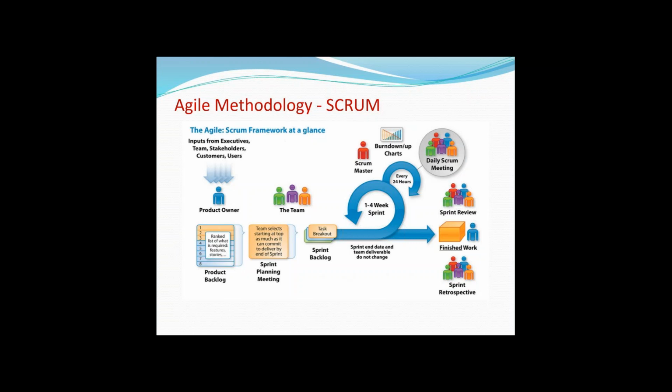So whatever user story is there, if you think that the user story can be completed in just 2 weeks, then in general people, based on their capacity, mark it as an 8 pointer or a 5 pointer. If it is a bigger user story and it cannot be done in 2 weeks, then they will break the functionality into two pieces.